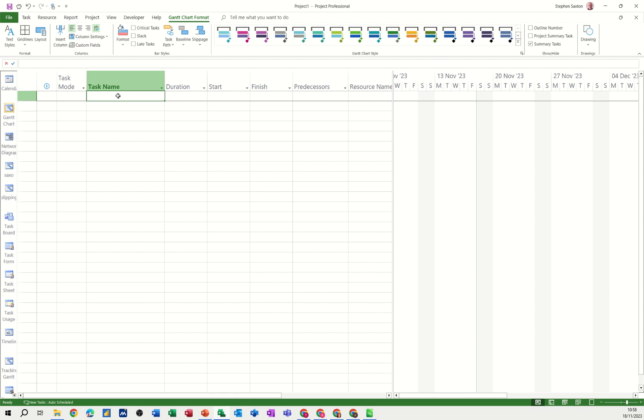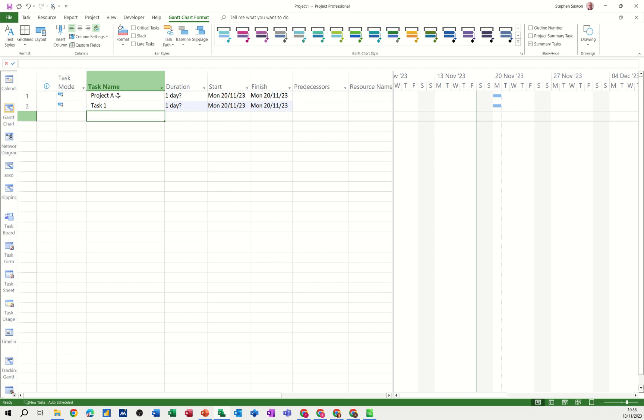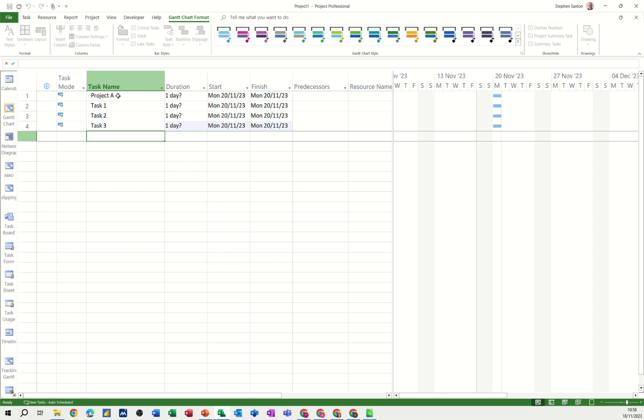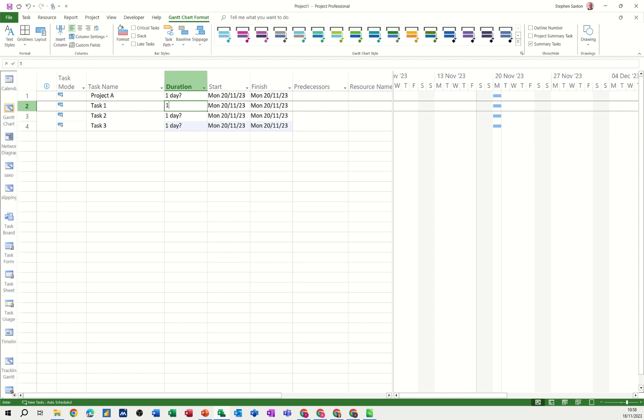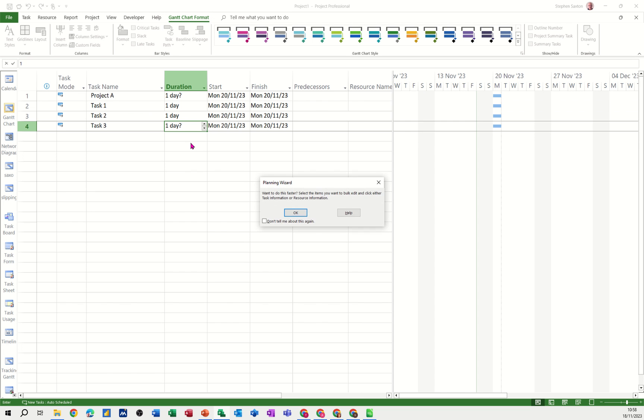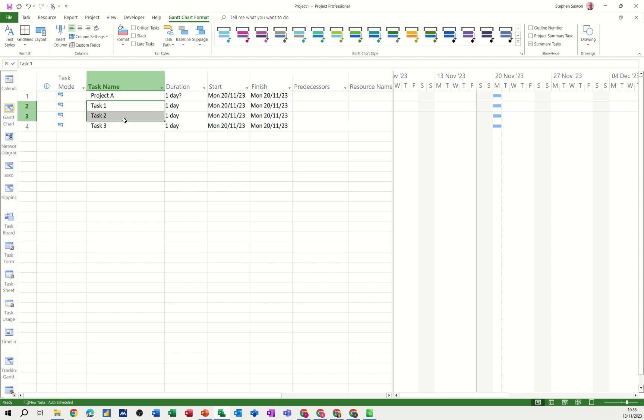So first of all let's do some little tasks. I'll call this project A, we'll have task 1, task 2, task 3. It can all be one day tasks. Press escape to get rid of that and then we'll just indent these three.